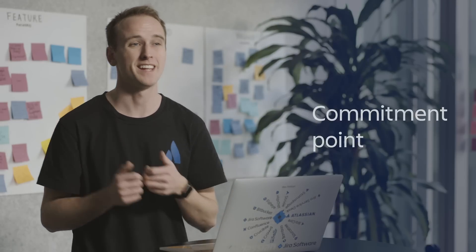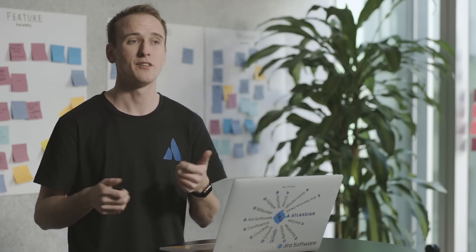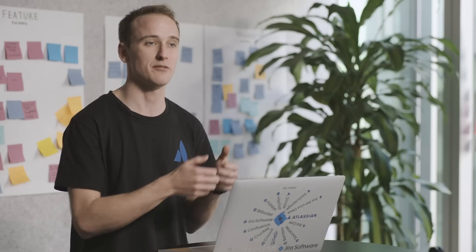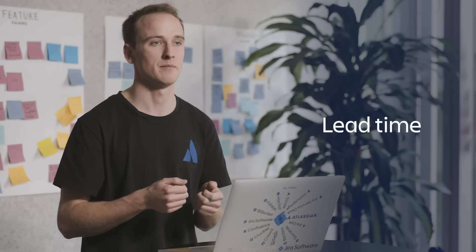Two important components of a workflow are the commitment point and the delivery point. Kanban teams often have a backlog for their board where customers and teammates put ideas for new projects. The commitment point is the moment when a team picks up one of those projects and work begins. The delivery point is the end of a Kanban team's workflow. For most teams, this is when the product or service is in the hands of the customer or done. The time that it takes to get from the commitment point to the delivery point is called lead time.